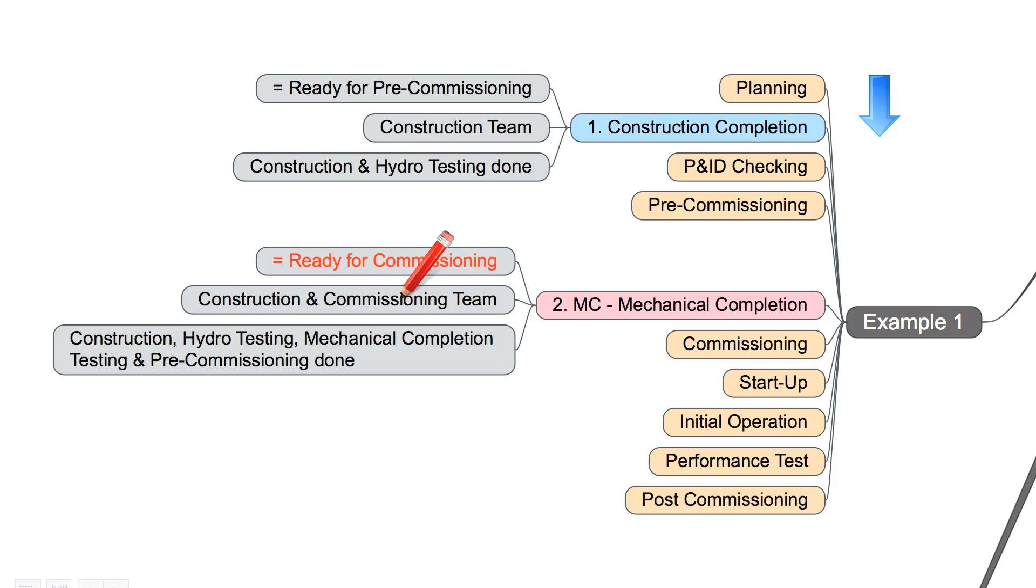And in this task the construction and commissioning team is involved. And this means in detail construction is done, hydro testing is done, mechanical completion testing and pre-commissioning is done. Therefore we have here another milestone called construction completion, which means ready for pre-commissioning. Mainly the construction team is involved and it means construction and hydro testing is done.